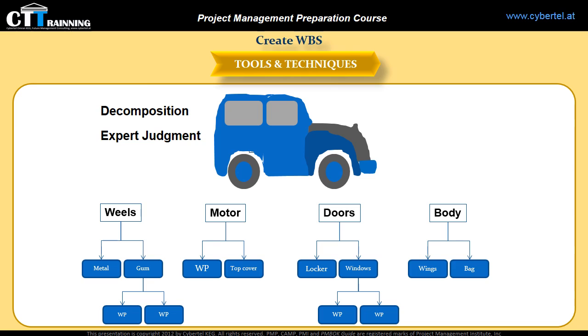In fact, when we decompose the upper level of the WBS, we subdivide the work of the deliverable and subcomponents into its most fundamental elements. The WBS could be developed as an Excel sheet or in the form of an organizational chart or other methods, but it should be a hierarchical breakdown. The WBS component represents a verifiable product, service, or result.